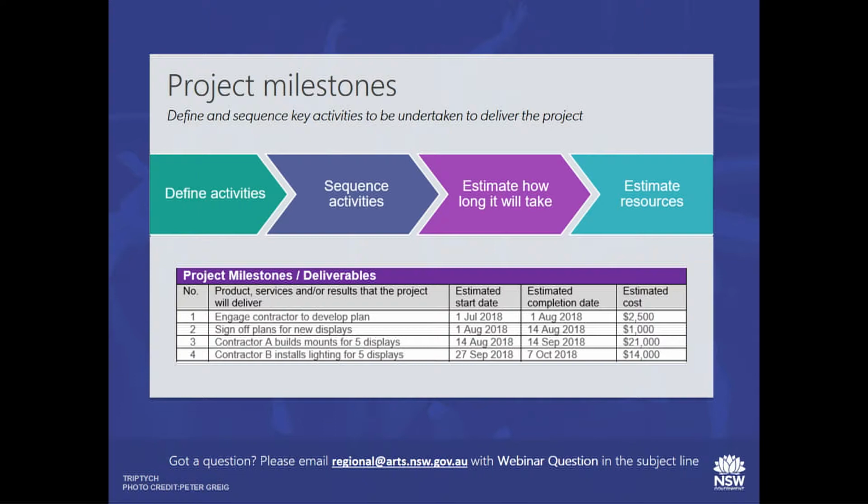All right. Something to add to that section, just quickly. We had a question here before from Tom about what's the difference between the EOI application and this new one, and I explained there are some areas that require more detail. The milestone table is one of those areas. It was quite vague and sort of narrow in the EOI. This is an area that we want to see more detail on because there are milestones in this particular part which could form part of your contract for funding at a later date. So they need to be accurate, robust, and also achievable.